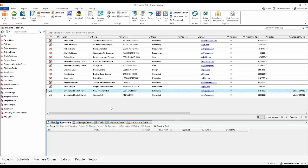As soon as you decide to use our new change order functionality, you will no longer be able to manually create revisions — we lock it down at that point. When a project is approved, you create your first sold revision, and then moving forward, revisions will be created automatically as you approve change orders. That's a new concept — approving a change order — meaning before changes go live. You'll see when I demonstrate that they truly are pending change orders.